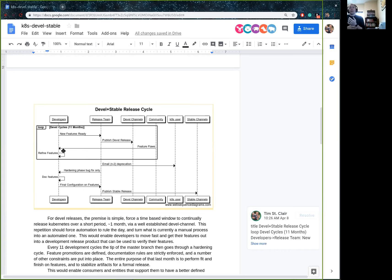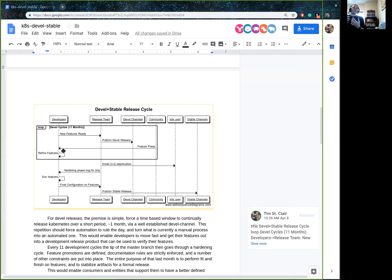I would be a fan of strict policy that your release doesn't go out unless you have certain criteria met — all new features are documented, user stories are in place, and your test apparatus is in place. By forcing a hard audit that allows no new code in, it incentivizes the developer base to actually do the right things. Right now we have a problem in the community of carrot versus stick — we have no enforcement policy. But that could be a potential policy during the stabilization or hardening phase.